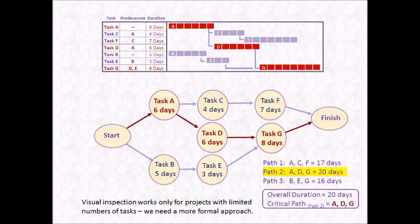For consistency, I've redrawn the network diagram using only the Activity on Node technique. By examining our network diagram, we can learn quite a bit of information about the project. For example, there are three parallel paths through the project. Path 1 consists of tasks A, C, and F. Path 2 consists of tasks A, D, and G. And path 3 consists of tasks B, E, and G.